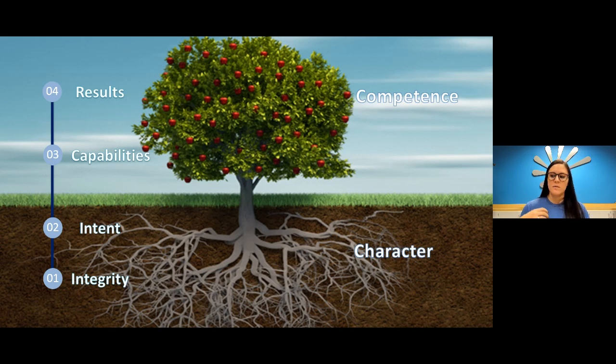So in terms of Scrum, that could be, hey, the stakeholder brings up a problem. There's a bug in production. Oh no, let's go fix that. Well, what if the problem that you're working on in the sprint is actually more beneficial to the end user than fixing that bug? Getting lost in the next most critical or top-of-mind item can lead you to not actually being able to deliver the result of the sprint. So intent, and figuring out how to create the processes to make the intent visible and to act in that regard, is the point here.